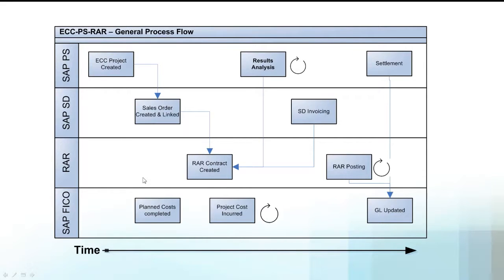A couple of things I need in advance for everything to fly correctly: I need to make sure I use plan costs, and then project costs are your normal charging to the WBS. When I finally run results analysis with the new key, RAR looks to update any related RAR contract because of the results analysis. Invoicing and billing still occurs pretty much as you're doing it today — there's really no change. What RAR is managing for you is the recognition of revenue based on percentage of completion. Finally, upon settlement, any remaining revenue that wasn't accounted for based on results analysis flows into the revenue stream.